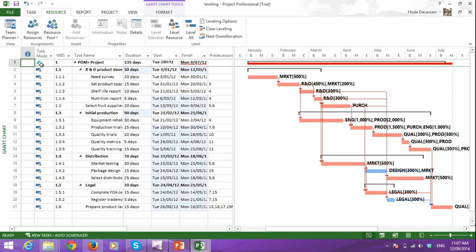The reason for me to put this one as manually scheduled is that we needed to set the start date to be in 2012, not today, so it was kind of impossible to put it as automatic, and for that reason it does not automatically update the information in this column, but it's always a better approach to put it for automatic, so you can see the updated information immediately.